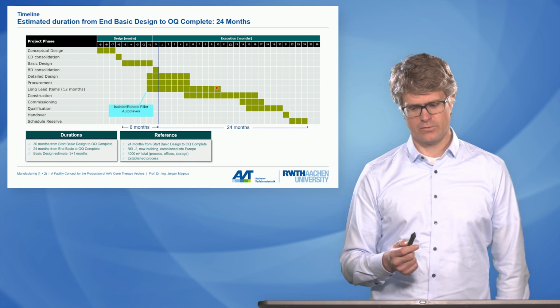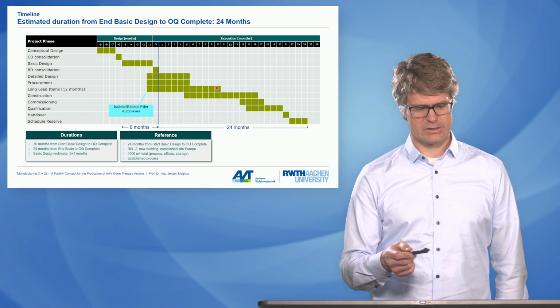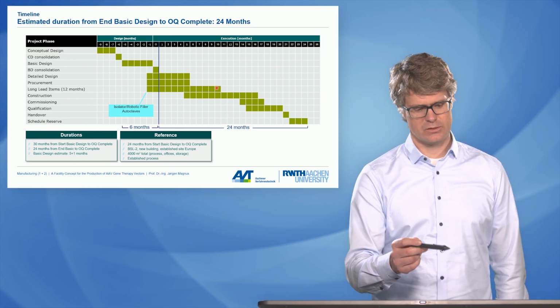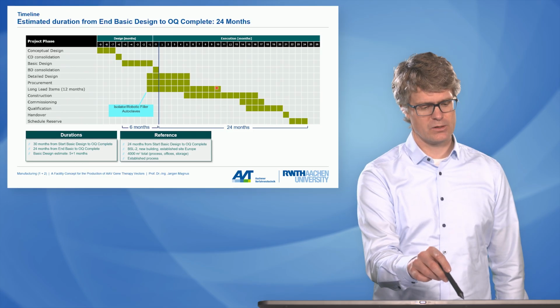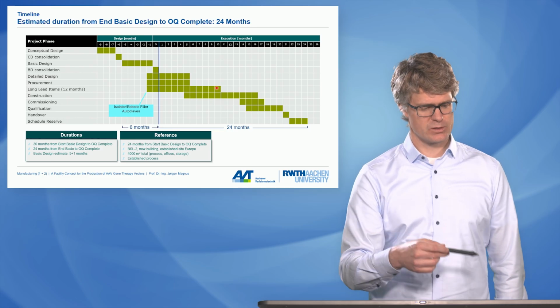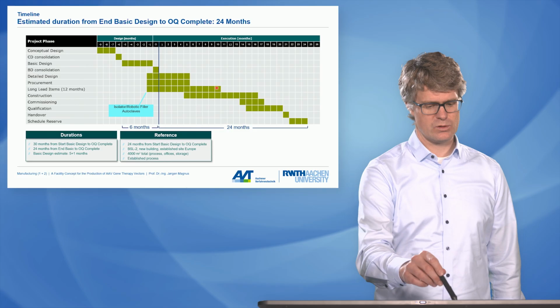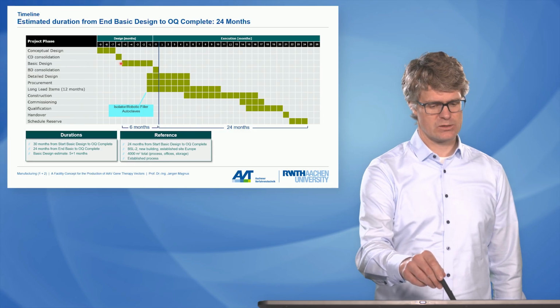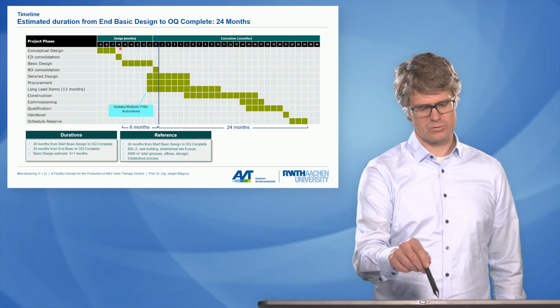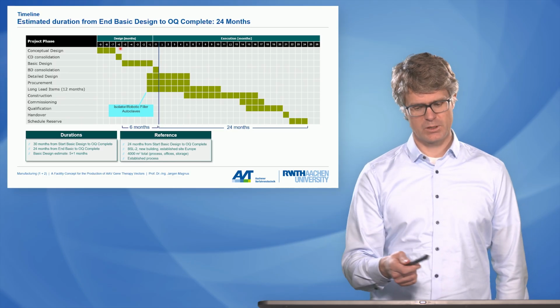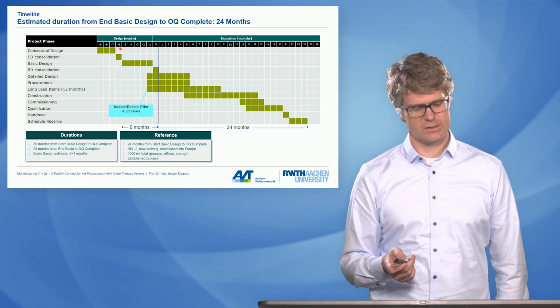It's interesting though for the company that invests that at the beginning they just commit to making a conceptual design study, and that only costs a few €100,000. So that's the only risk that you take at the beginning when you do a conceptual design study. But later, when you have spent more money, you increase the risk of losing money if you want to terminate the project.